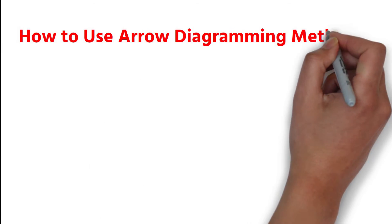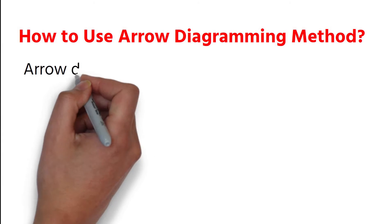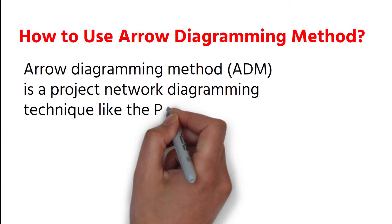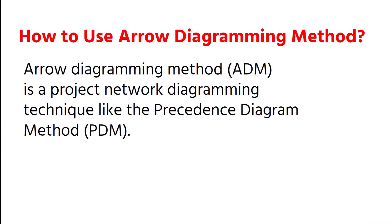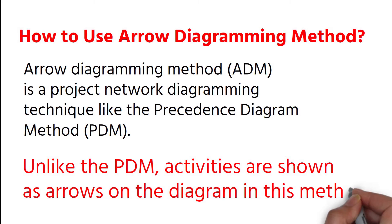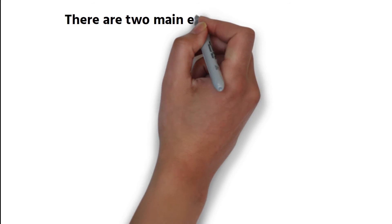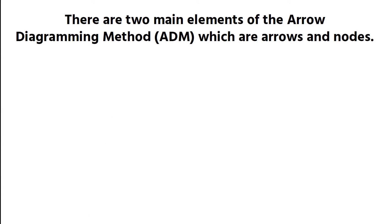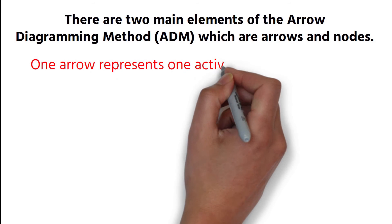How to Use Arrow Diagramming Method. Arrow diagramming method is a project network diagramming technique like the Precedence diagram method. Unlike the PDM, activities are shown as arrows on the diagram in this method. There are two main elements of the arrow diagramming method which are arrows and nodes. One arrow represents one activity to be performed.